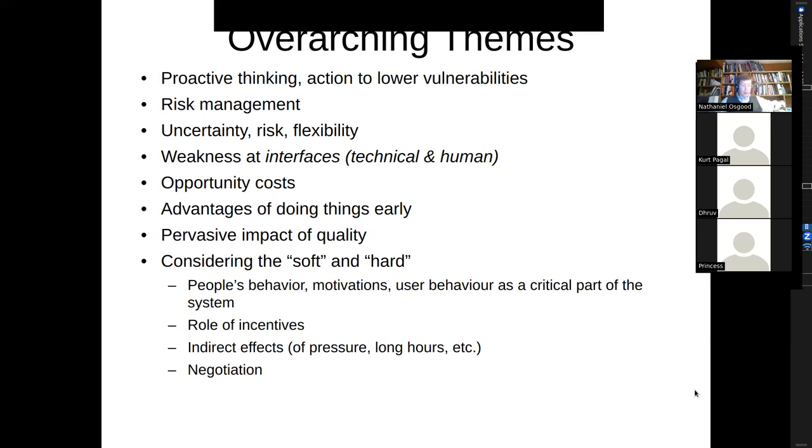Advantages of doing things early, whether they're inspections or spike prototyping, clarifying an issue with the stakeholder, right? Or thinking through a risk. Doing these things early is often really valuable to give yourself more lead time if bad things happen, or to go and make other choices if it turns out a certain line of work is too difficult, or a certain type of work.